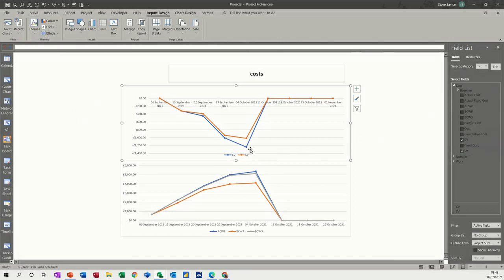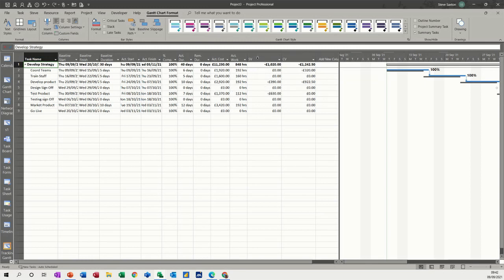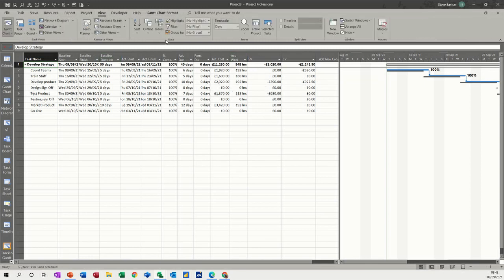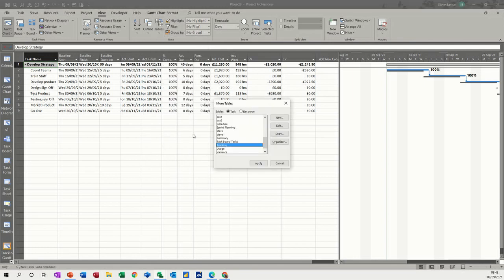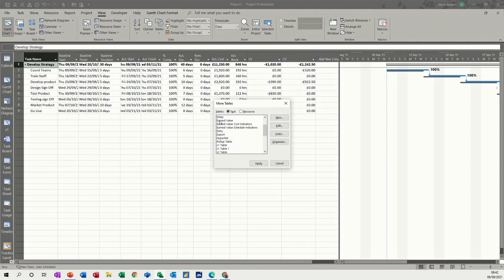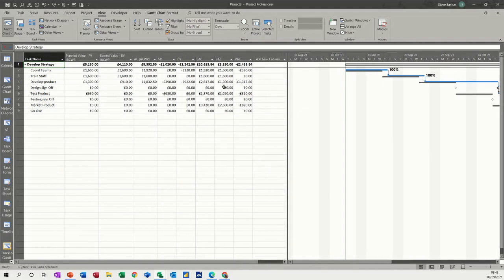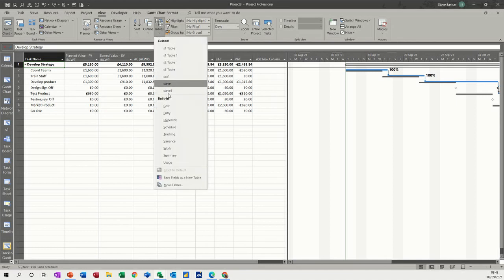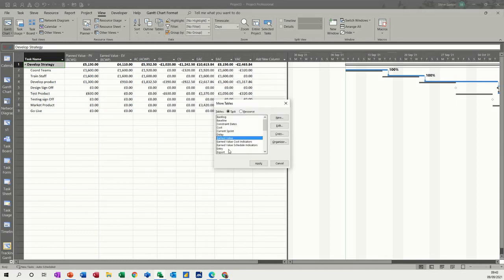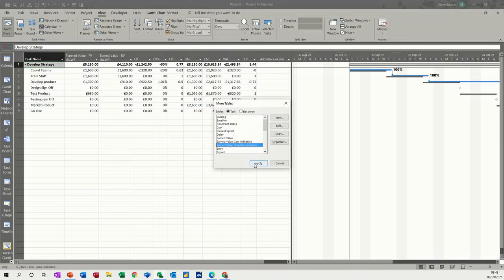I wanted to show you basically where you get the information to put in these fields and what triggers it - the status date. You have to save a baseline, you have to use a status date, otherwise it doesn't work. There are other earned value fields if you want to have a look at those in the actual tables. Earned value tables give you all of these - scheduling variance, cost variance there. You've got the cost indicators and the scheduling indicators.